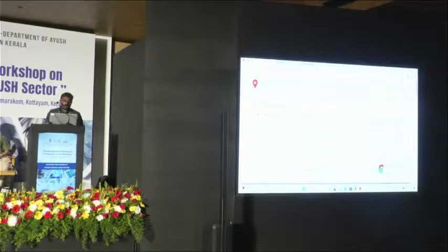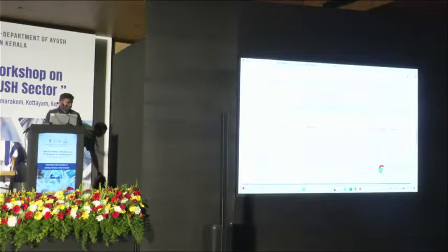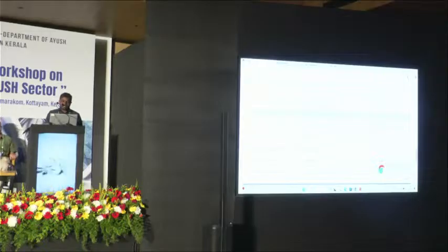First, AS and TS non-issued works, which means this card needs some inference from higher level officials like the State Mission Director for the non-commencement to commencement, and we have 63 works. Second is AS issued but TS not issued works. And third is AS and TS issued but non-commenced works. These 2 types are in file process stages but not yet at the site stage.